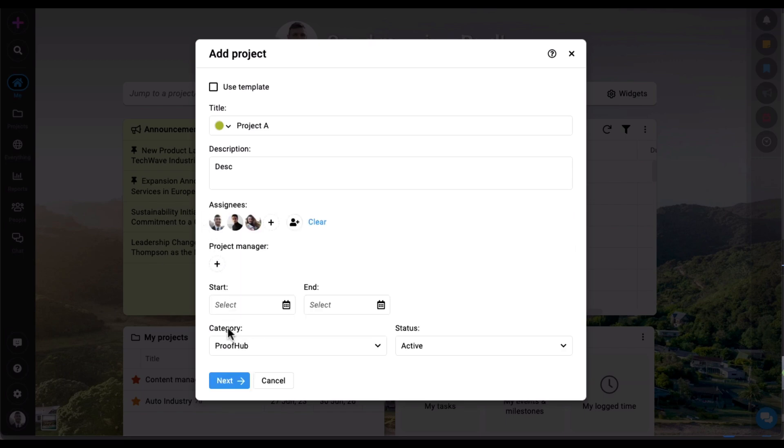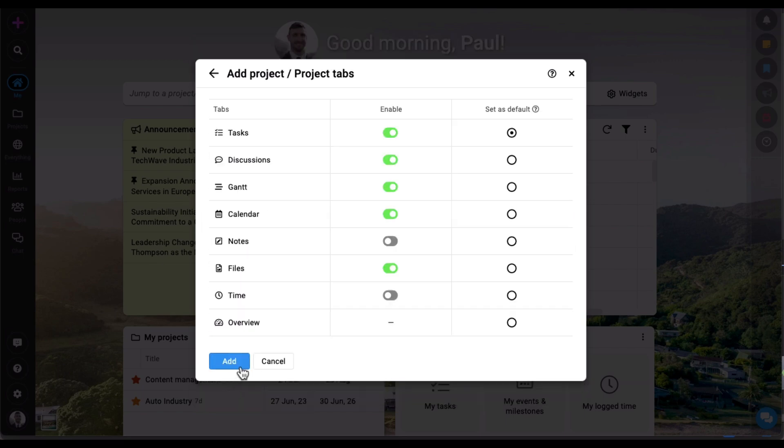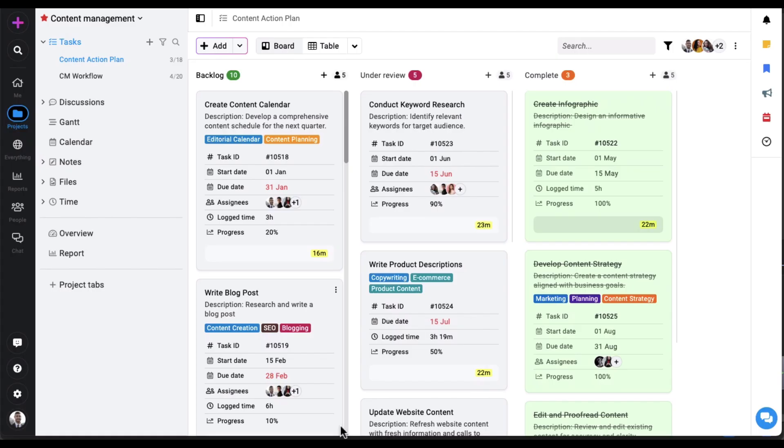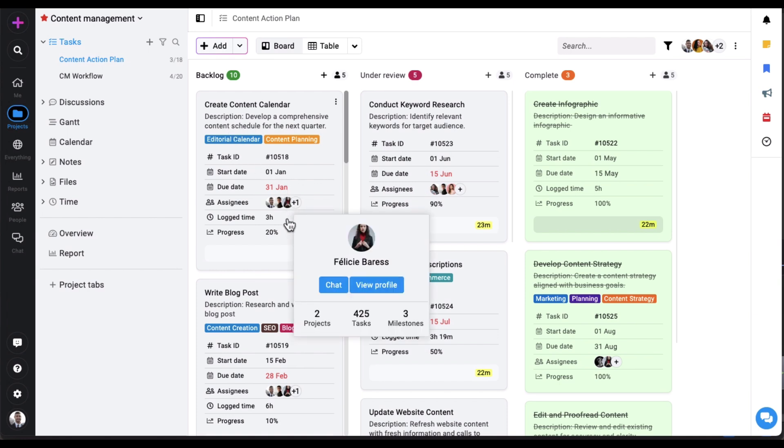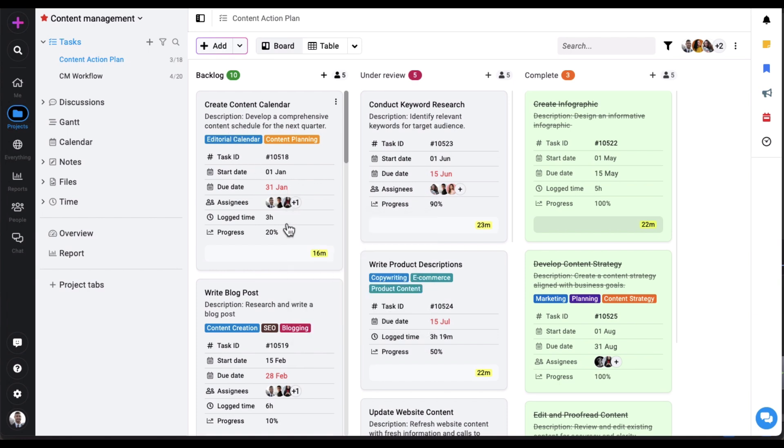As you jump into a project, the very first thing you get is the task section. In the task section you can manage your task lists, create tasks and subtasks, set start and due dates, assign them to multiple people, track time spent on tasks, and mark progress.